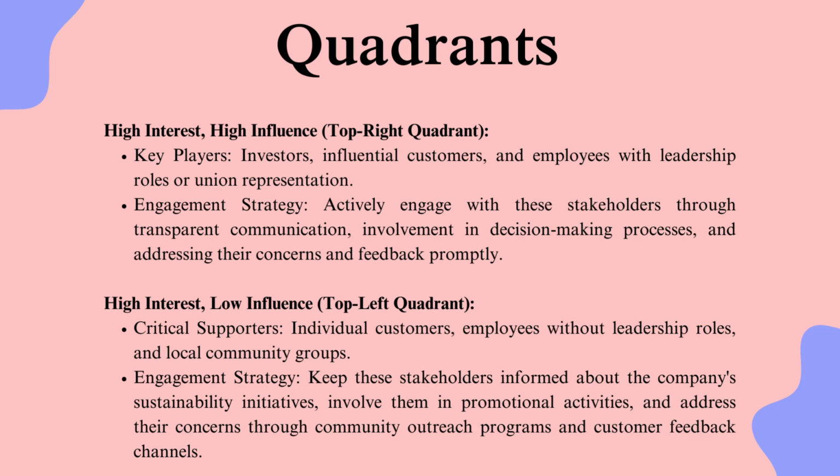Critical supporters are individual customers, employees without leadership roles, and local community groups. Engagement strategy is to keep these stakeholders informed about the company's sustainability initiatives, involve them in promotional activities, and address their concerns through community outreach programs and customer feedback channels.